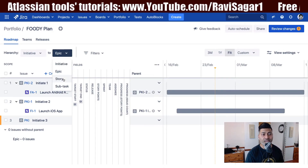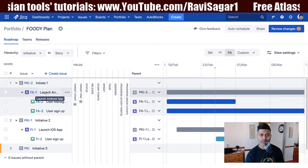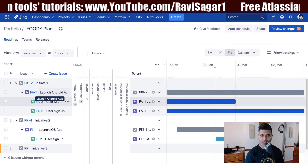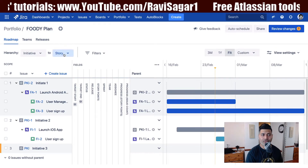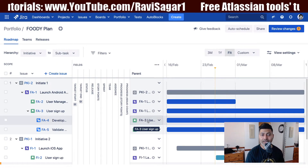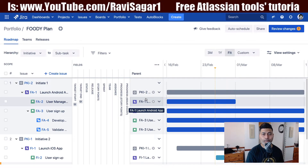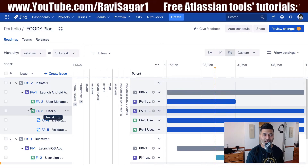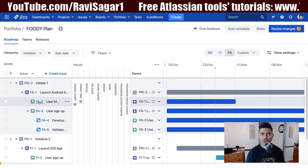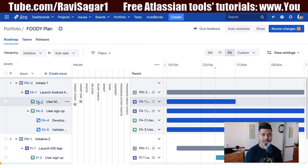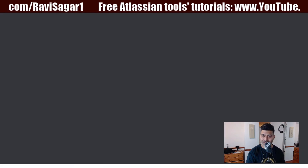You can drag and move epics to a specific parent — in this case, an initiative. When you look at the field called 'parent' in the improved interface, you can see that the epic 'Launch Android App' is now part of Initiative One. At the story level, the parent field shows the epic name, and at the subtask level it shows the name of the story. This parent field is really important.